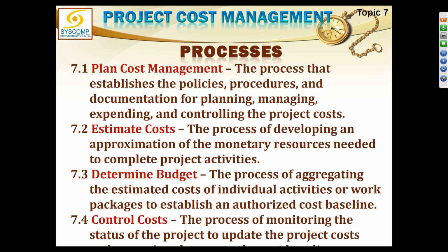Say your estimate is 5 million rupees, and you say, okay, this is what this house can be built in. You quote for that naturally after building in your margin, and you say, I will ask for 6.5 million, and after negotiation you are awarded the contract at the cost of 6 million. Now you already knew that this can be done in 5 million, and 1 million is your other expenses and profits. Now you ask your project manager, when you hire him, how much will the project actually cost on ground?